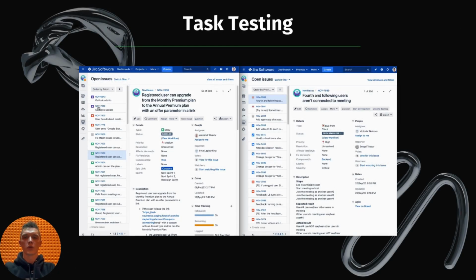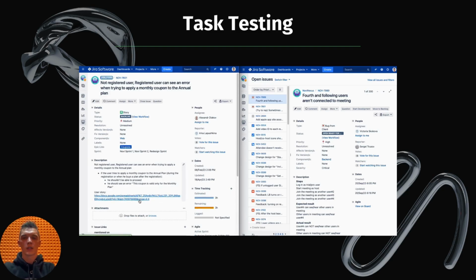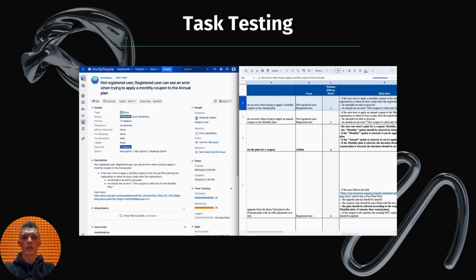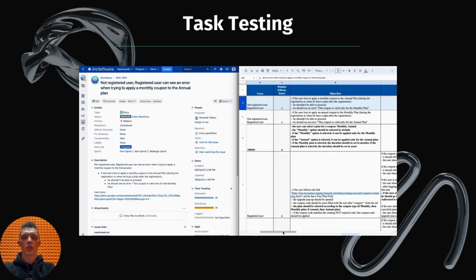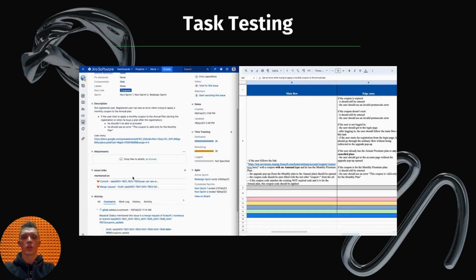Based on the user story and wireframe in Jira, design tasks in the application itself are created. Before the tasks are put into work, the QA engineer reviews them. The testers make sure that the task is unambiguously formulated, described in sufficient detail, and does not need decomposition. An important point of checking tasks before development is the compilation of acceptance criteria. The tester formulates and attaches readiness criteria to the task.